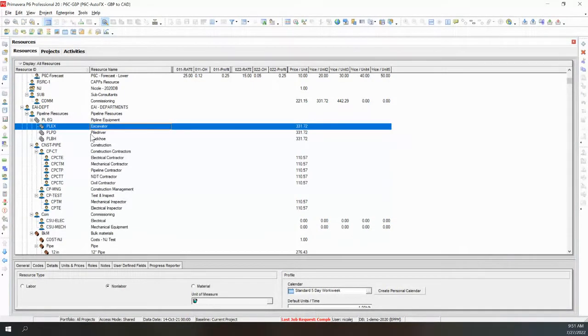5 different rates, okay? So for our clients that want to do a lot of costing, we introduced rate user-defined fields. So we could allow them to do different rates on every project. By doing that, we use P6-Calculator to take advantage of the fields and to calculate all the different rates, okay? So this brings a lot more flexibility to P6. So if you're a contractor and you're finding it a little limiting, we've already solved this problem with other clients.